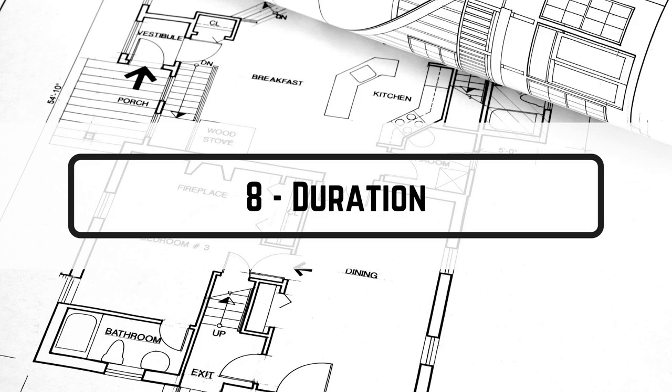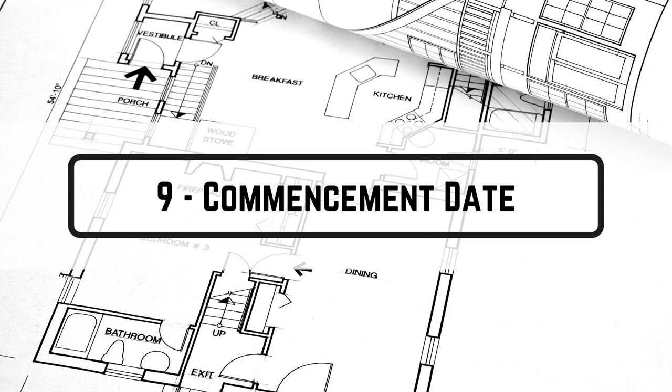Term number eight is duration. The contract duration is the time required to complete and hand over the works. When you award works, you must agree the duration and keep it in the contract. If the subcontractor doesn't finish on time, he is in breach of his contractual obligations. The duration can be the total project duration, with a detailed program to be submitted after signing, or the detailed program can be included as part of the contract.